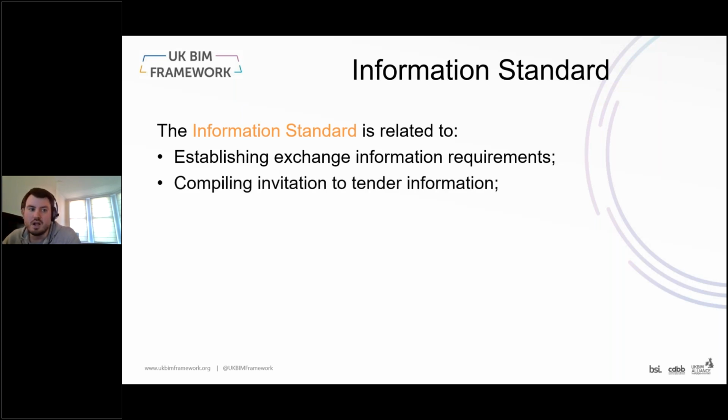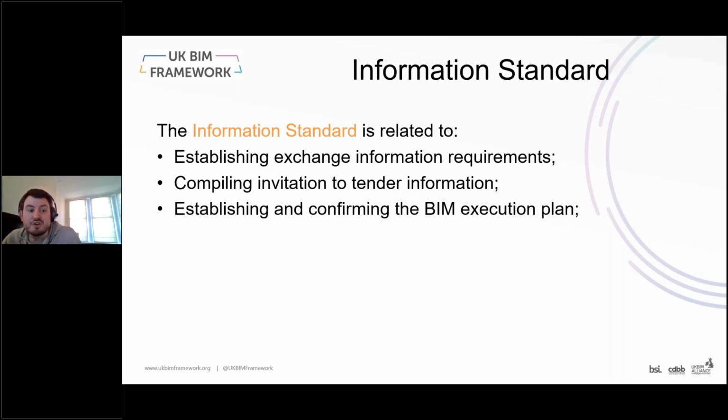As a key document that should be cited in something like the information protocol, it's key to actually collecting the information together when tender information is being compiled. It's used both in establishing and confirming the BIM execution plan, as lead appointed parties are able to review it and then propose alterations and amendments to the information standard. This is because while the appointing party might establish the key processes and or bits of information needed for them to achieve their information requirements, a lead appointed party will have their own information requirements they'd want to ask of their respective task teams and may want additional bits added to the information standard so that they can actually be achieved.